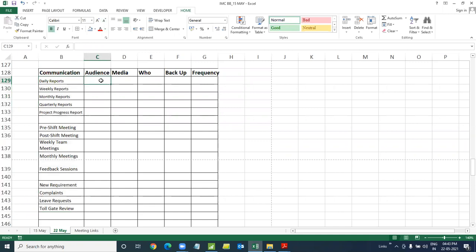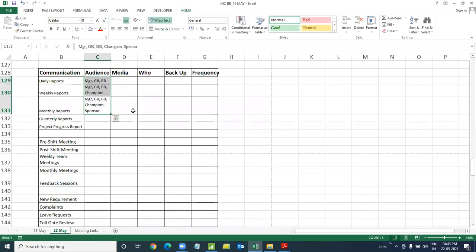Audience. Now, who will be required to get this daily report? Do you want to spam your CEO's mailbox with daily reports? No, probably not. So I'll define the audience, the recipient, probably the manager, say the green belt, the black belt. Only we will keep it. Weekly reports, we probably want to keep as it is, plus we would like to include the champion. Monthly reports, we will definitely include the sponsor also. As a team, we'll sit down and plan for all possible stakeholders who need to be included in this communication, so we don't have a problem later on in terms of managing the expectations of these people.